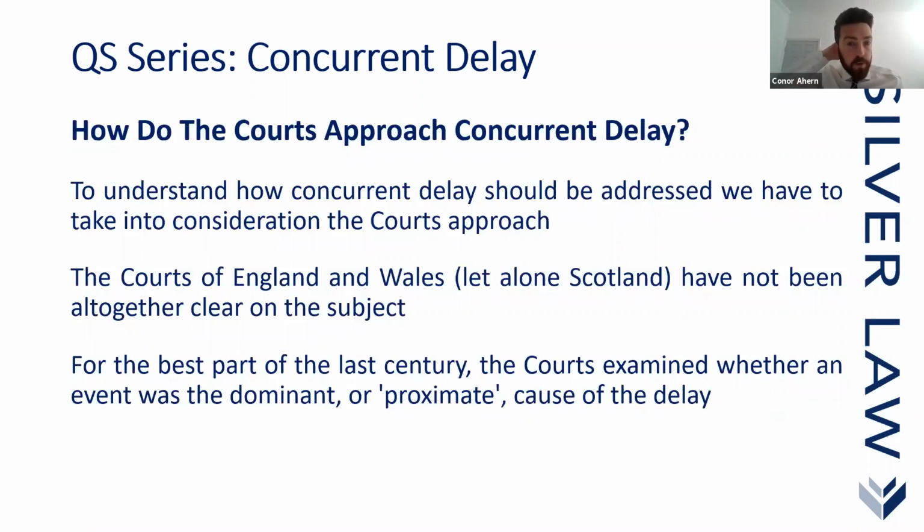To understand how concurrent delay should be addressed, we have to take into consideration the court's approach. Now, the courts of England and Wales, let alone Scotland, have not been altogether clear on the subject. The position in Scotland is actually different to the position in England and Wales. There's a case called City Inn versus Shepherd in Scotland that we'll discuss later on, and we can see how it differs in its approach.